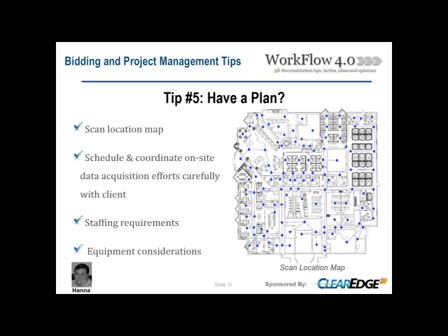Tip 5, have a plan. This might be obvious, but I know sometimes when we're bidding a job, it can be overwhelming. If we have the benefit of seeing the site and visiting it, it helps. Sometimes, as Matt indicated, we don't always have those luxuries. So we do our best to pre-plan how we're going to scan it. Knowing the information we have, we'll develop a location map. That will then drive a proposed scanning schedule.